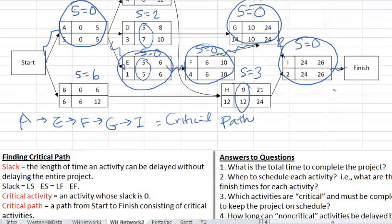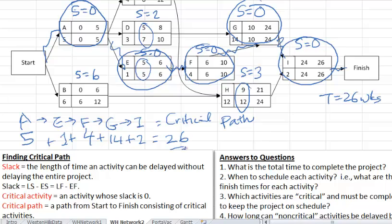So here, remember that the length of the project was 26 weeks. So let's see if the length of this path matches up that number. By length of the path, we mean if we were to add up the durations of the activities on that path, the sum would be the length of that path. So here we have 5, and then 1, and then F is 4, G is 14, and I is 2. So that gives me 6 plus 4 is 10, plus 14 is 24, plus 2 is 26 weeks. So length of the critical path is the same as a project time. That's not a coincidence. That is always the case.